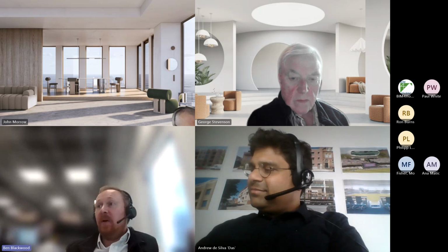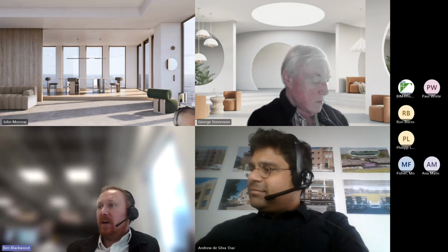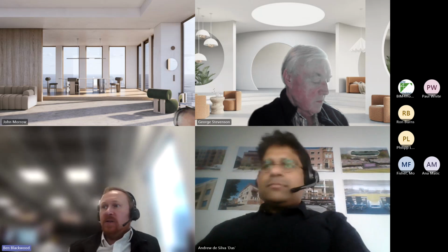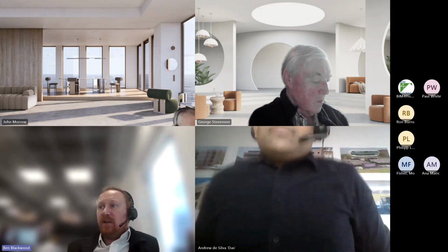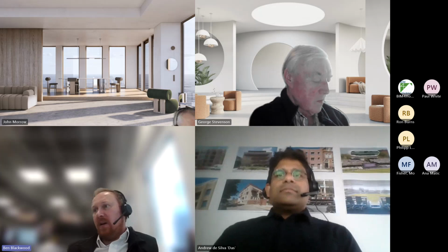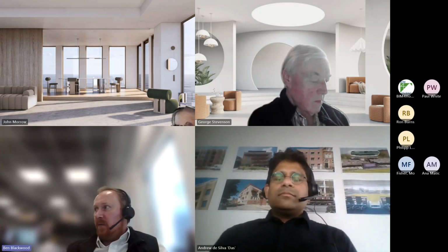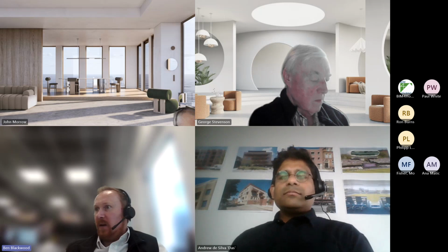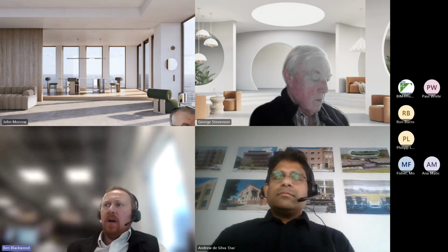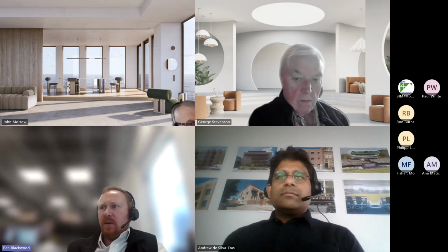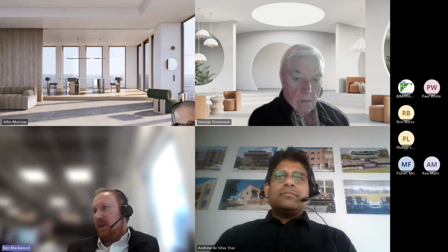So they're saying, right, this building's just about ready to hand over. So we've got to then simultaneously check all the information, register the building, and upload the KBI. And we've had a few where we've gone to register the building and the BSR has asked, is the building occupied? And we said, well, no, obviously, because we haven't registered it yet. And they've rejected our application on that basis.